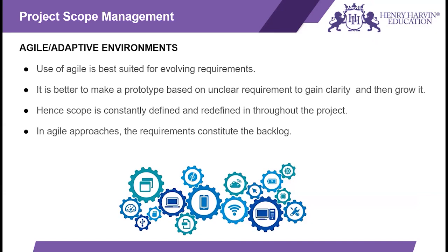So this prototype is not for the immediate requirements. It is for the future and upcoming requirements. Yes, generally that's the way they work. You have current work, and you're clear on that. The team takes time out from their regular activities, which is very much built into their plan itself, to refine the future requirements. So you sit with the product owner or the customer to gain clarity, make a prototype, and give them the assessment so that you get more clarity and then it is possible for you to expand it out.